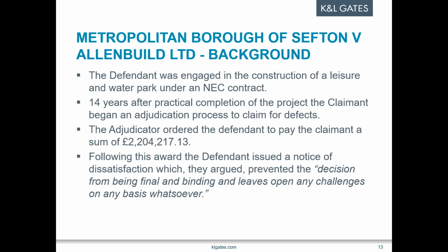For those of you that did attend last year, I did speak about a couple of cases on the same topic, so just here now for a brief reminder of those. One of them was Transport for Greater Manchester and Kia, which set out some guidance on the formal content of such notices. It stated that no specific form of words or level of detail is prescribed in the relevant clauses, and a notice needed to state that the decision was being disputed, but did not need to detail or explain or set out the grounds on which it was disputed.